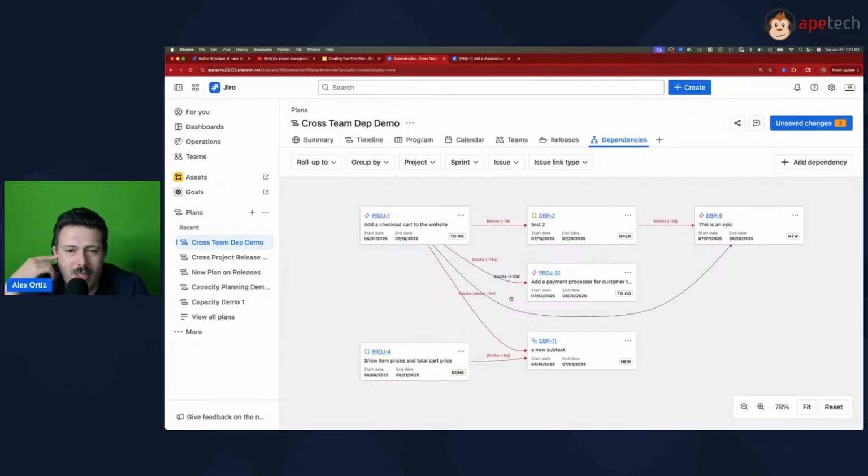If we have to remember that PEMDAS, that order of operations, then this is going to tell us that any story underneath this epic should happen before anything else. Because if this epic doesn't get completed, we are blocking three things. So a combination of this epic and this story need to happen first. And if you were planning your sprints, this is going to tell you this needs to go into sprint one, this would be the next sprint, and then followed by the third sprint.